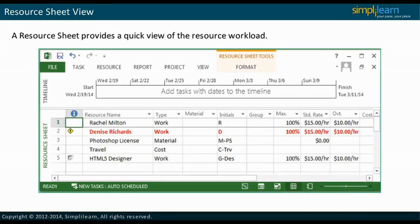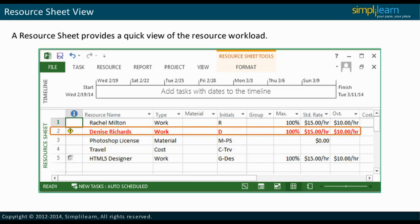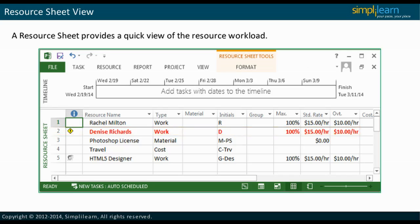A Resource Sheet provides a quick view of the resource workload. The screenshot of a Resource Sheet view with an over-allocation issue is shown here. For an over-allocated resource, the text is in red and the Indicators column displays a yellow diamond with an exclamation mark. However, this view does not indicate the assignments on which the resource has been over-allocated and the dates when he is over-allocated. In the following slide, we will take a look at the Resource Usage view.